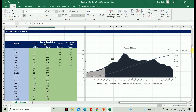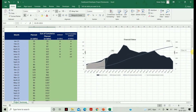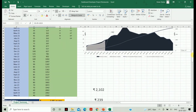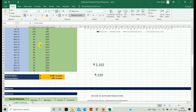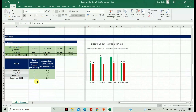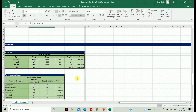This is your cumulative planned versus cumulative achieved data — this is the area you have to fill in, which gives you your planned value and achieved value. The next section is the Milestone section — here you need to update all the data so that your inflow versus outflow projections will appear. The next is the Resource Data section, where all data related to your resources like material, on-site agency, etc. has to be updated.